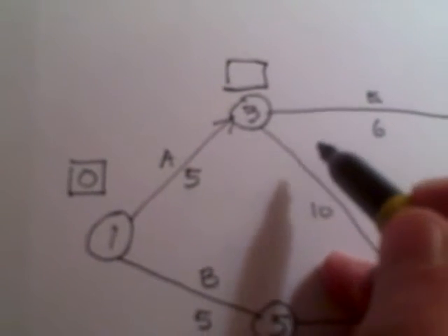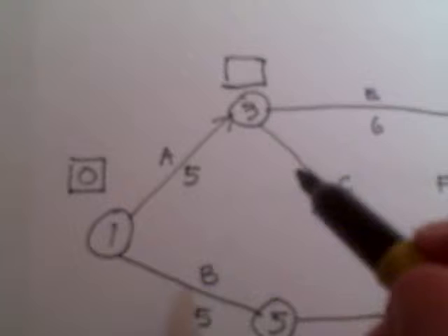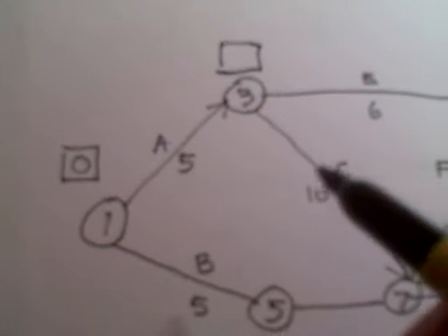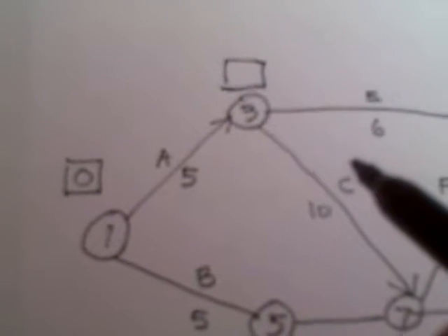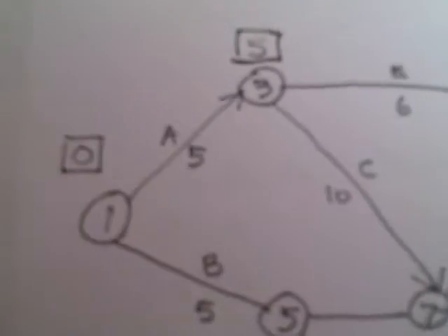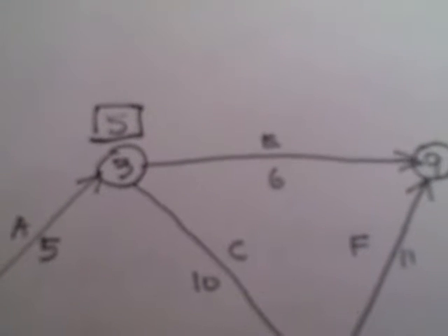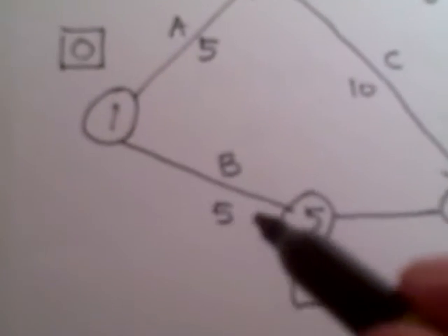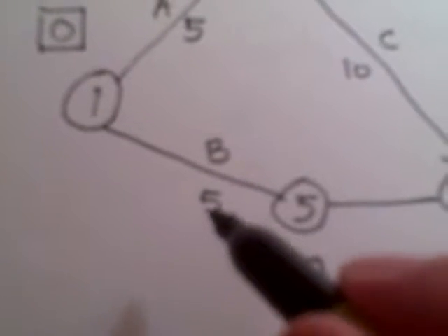So these activities following A cannot start until A is finished. You can see how the precedence takes effect here. So this becomes a 5 in this square, which simply says that these two activities cannot start until the end of day 5. And going down below here, we notice that B has a duration of 5 days, and 0 plus 5 is again 5 in this early start square.